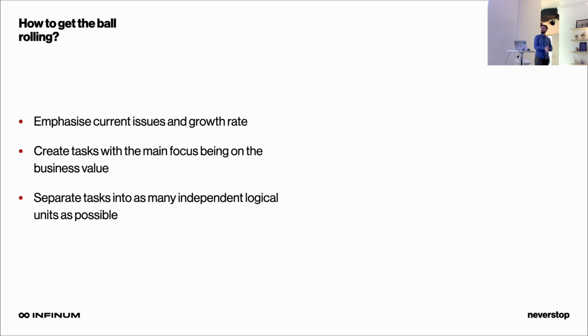Well, why? Because that will not only make the board look more structured, it will be more clear what you need to tackle. You will have more tasks, which might seem overwhelming, but you can say it like this. We don't have to tackle everything all at once. We can tackle it chunk by chunk, as it is separated independently. In that way, the client won't be overwhelmed by the total amount of hours needed for a certain refactor or something else. And to draw a comparison, if you're watching a YouTube video, you will probably watch a couple of shorter ones, rather than one that's longer.